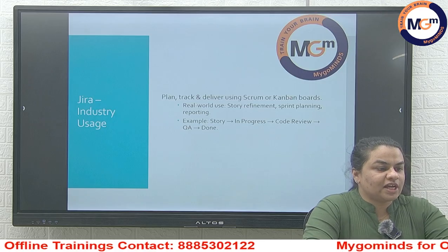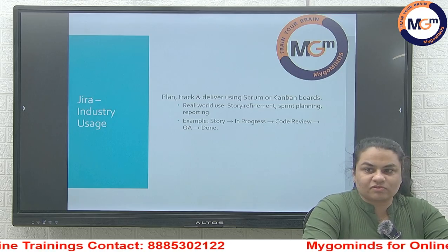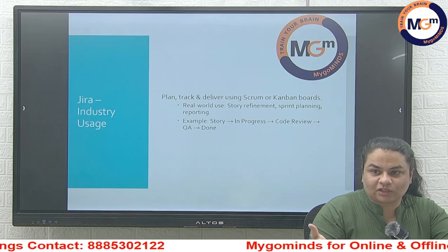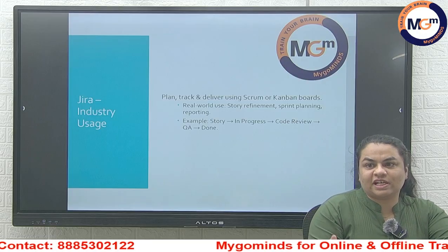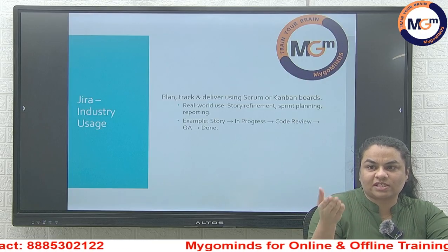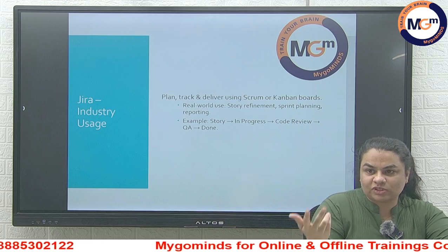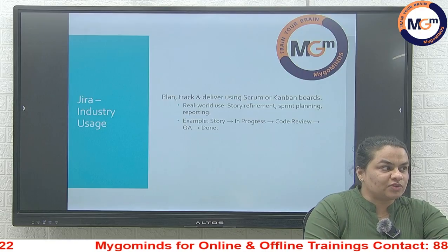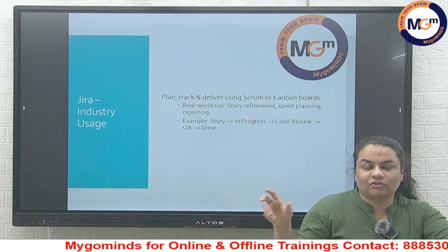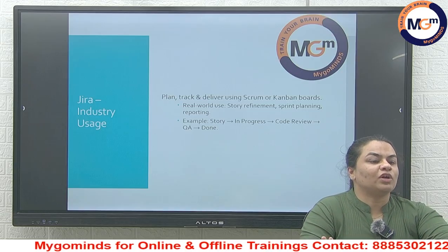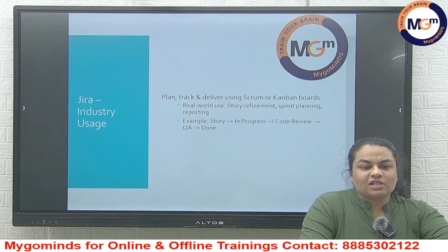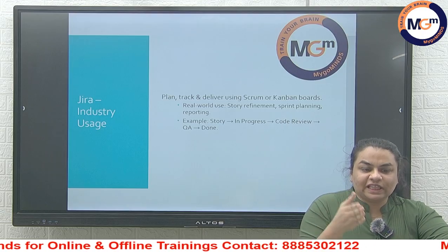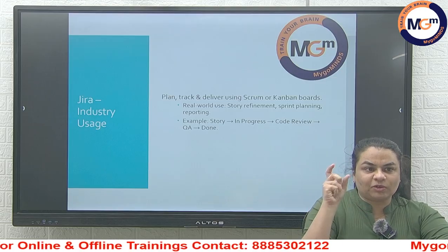To break it to you guys, most of this work will be done by either the project Scrum Master and the product owner. Those are the people who will decide which stories to go, what the velocity is, how many points will be used for this particular sprint cycle, what the acceptance criteria is, and what the definition of done will be. Those two people will decide what goes into the user stories, and they will assign which team is going to do what.